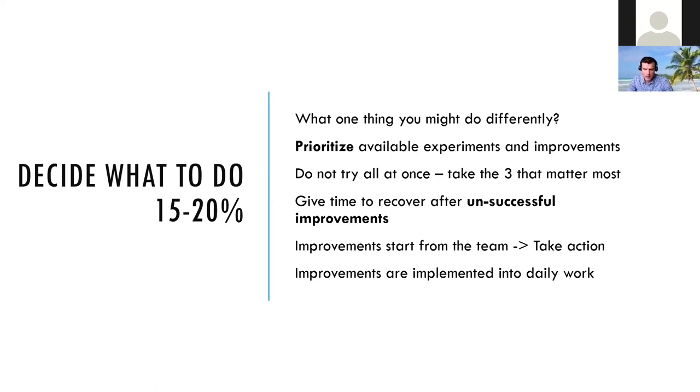Okay, so one more time. At this stage, it's defined who does what by what time. So the result solves the problem, like we've got the use case definition. I would say that the definition for this stage is who does what by what date, and the result solves the problem. Everything actually is over there: who is accountable, when, what cure for what disease was made. Okay, so that's the thing.